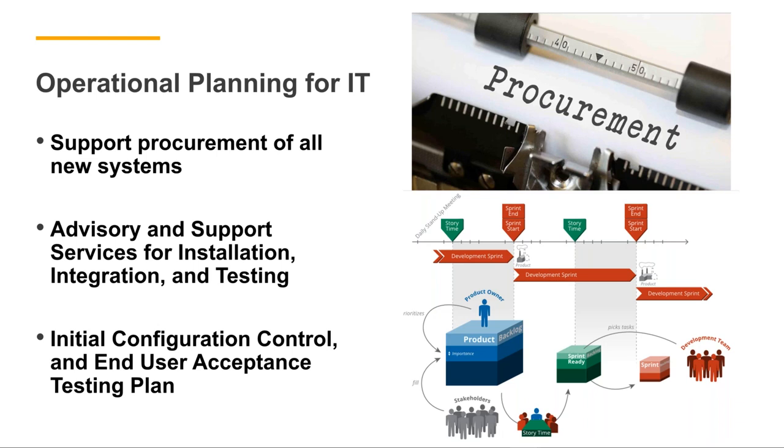And it's best to do it during the construction and commissioning phases, because then you get the opportunity to take care of it and you don't have scientists just standing around in the facility not having the IT support they need to do their science. And then finally, confirming that the end users, the scientists in the facility, the laboratorians, the operational staff, the facility staff, EH&S staff, HR, making sure that everything from a functional perspective, all of the IT capabilities and support that are needed actually work for the end user. And like I said, that's something that you want to do as part of the process in an offline network before it goes live, prior to the scientists all being in the facility. It's one thing to get everybody in there. It's another thing to make them actually have their full ability to do their jobs. And that's where we definitely believe that operational planning for IT can really help get them doing their jobs in an expedited way.